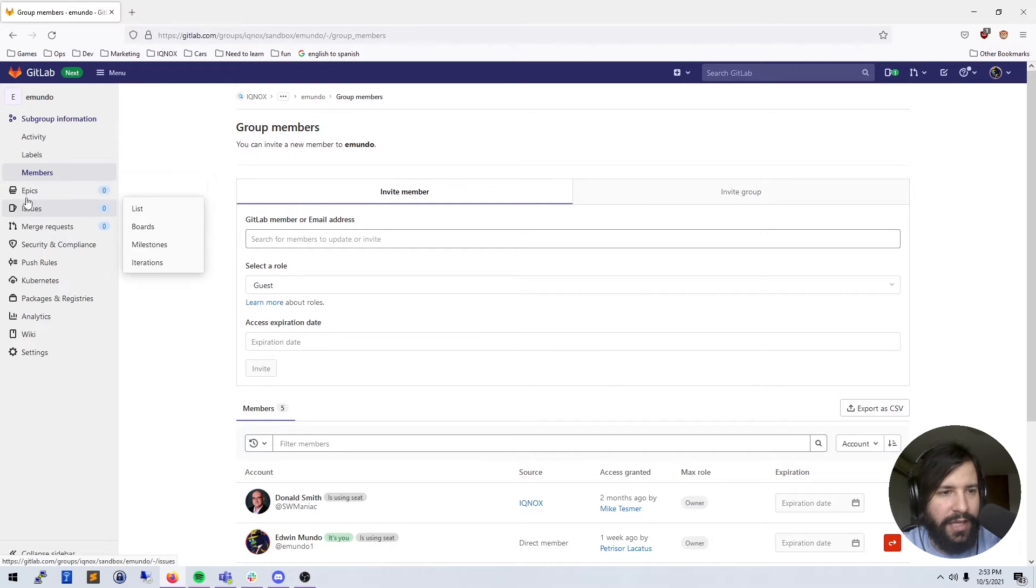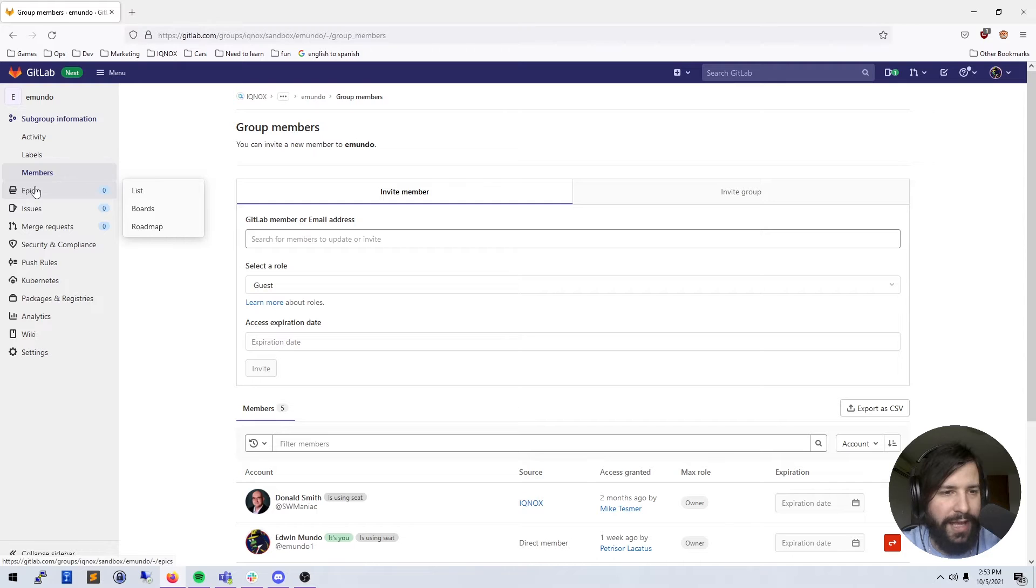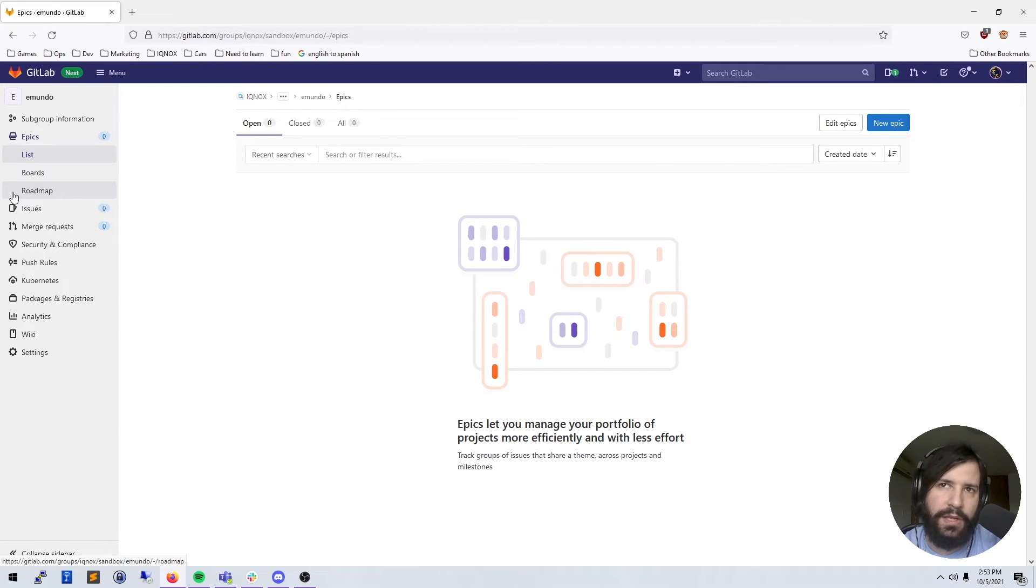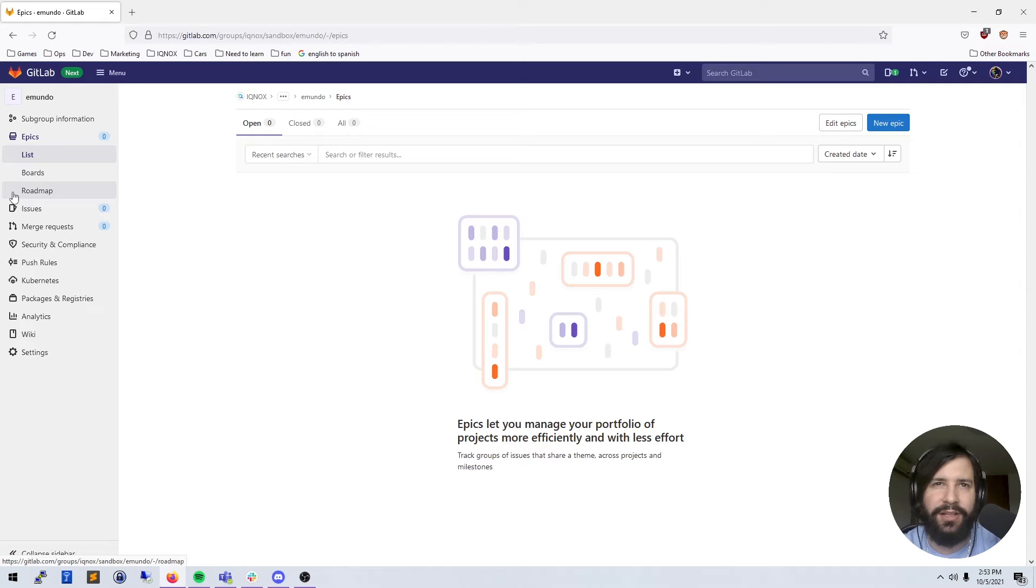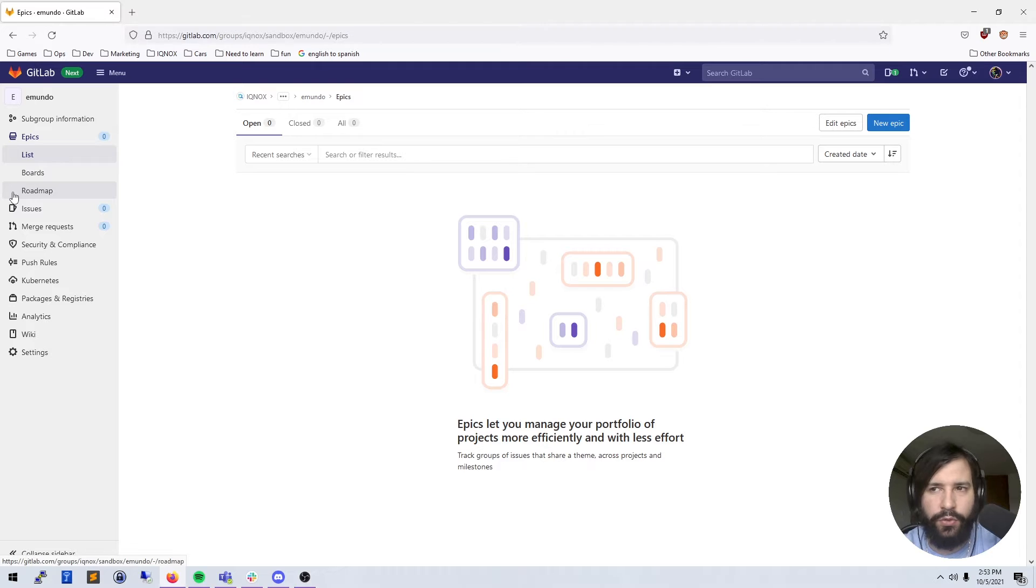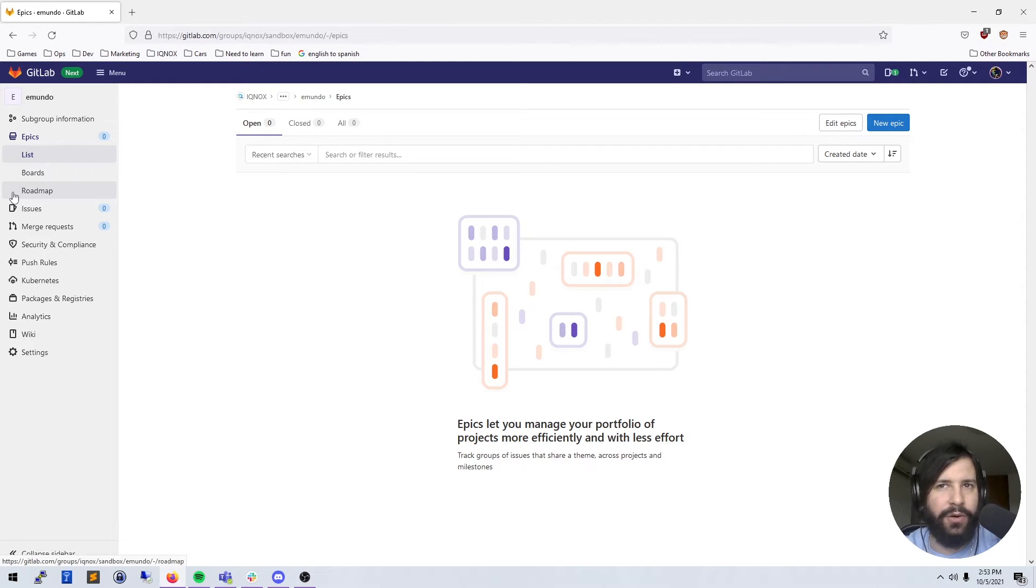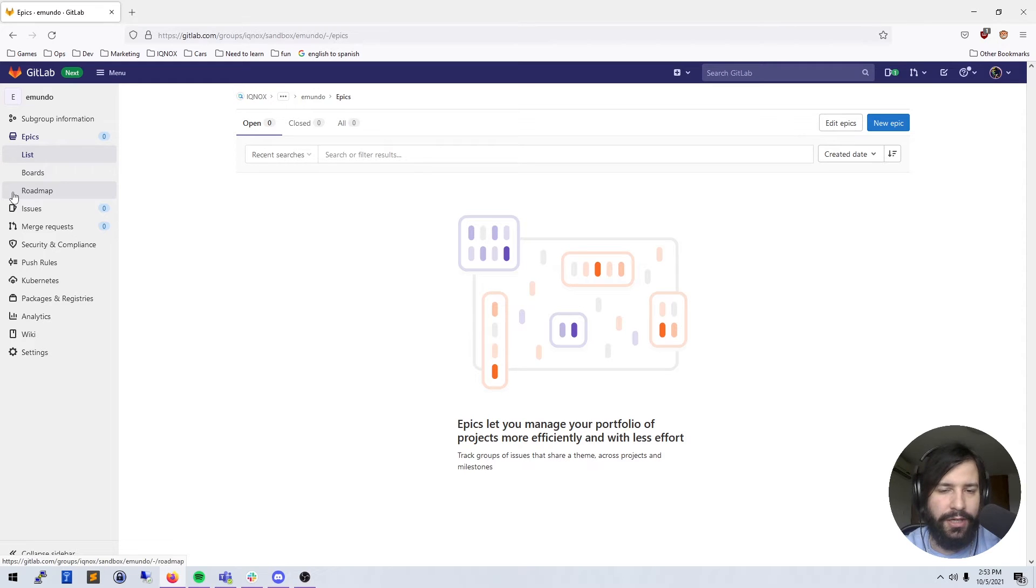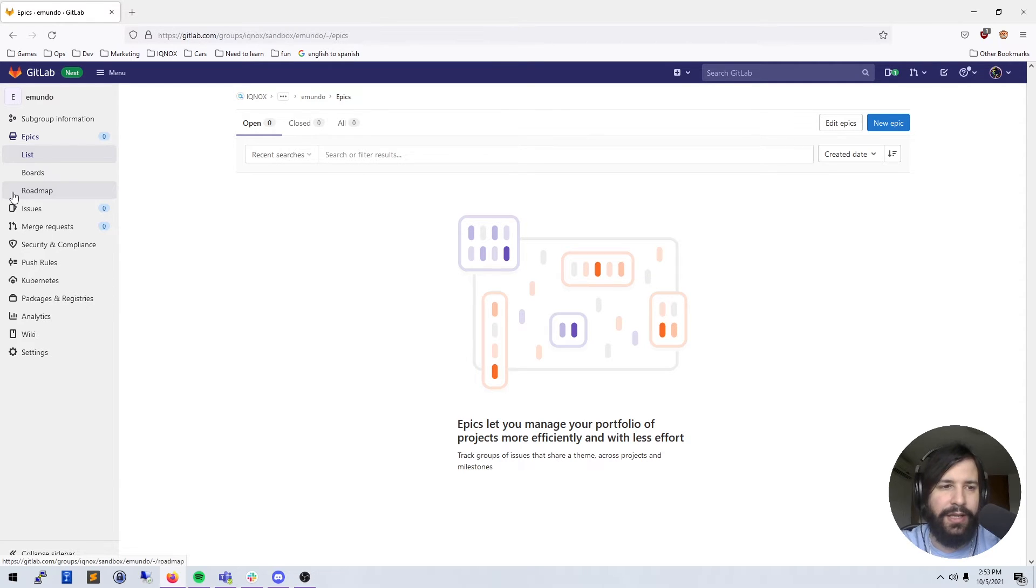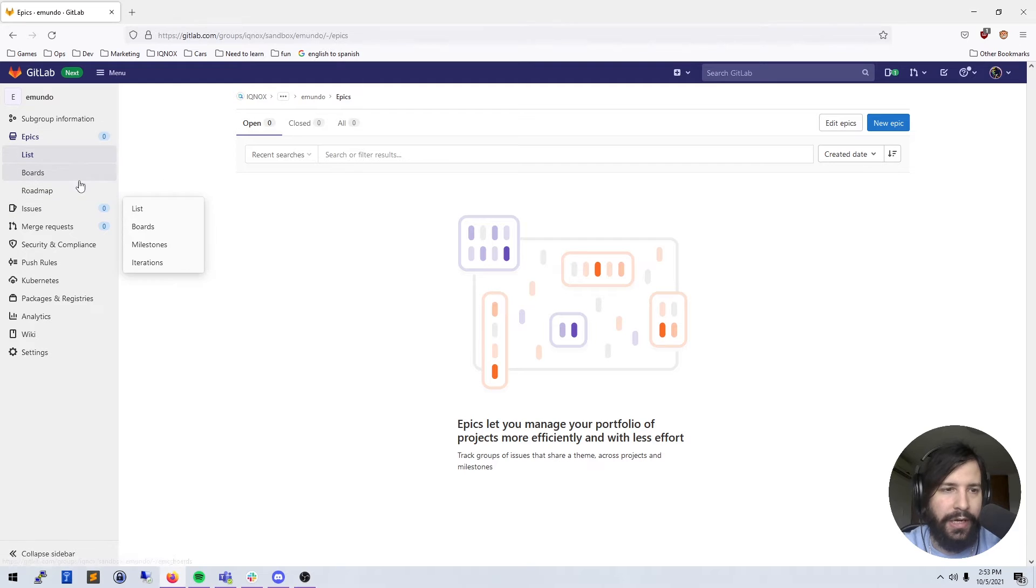Moving on from there, we have the epics. Epics are like collections of sprints or collections of work. So let's say I have a feature that I'm trying to move towards, but it's going to take me maybe a week or two to finish. I can put all the user stories and sprints inside of one epic and then I'll be able to track the work that way.